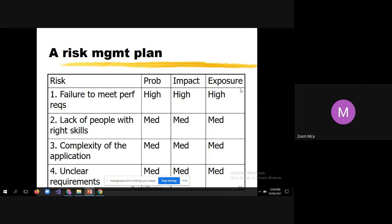For 'failure to meet perfect requirements,' the probability is very high — when you document requirements from a client providing too many, there are always chances of missing some. The impact is also very high because just before delivery, during acceptance testing, the client prepares test cases and you will discover something is not implemented. The risk exposure is therefore very high.